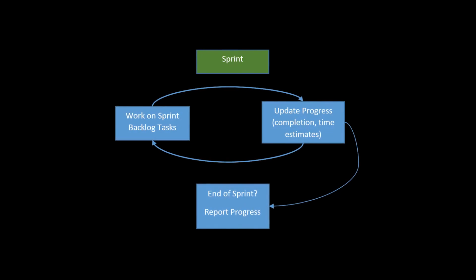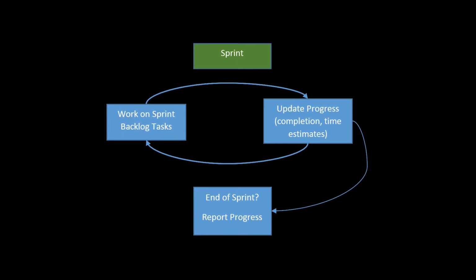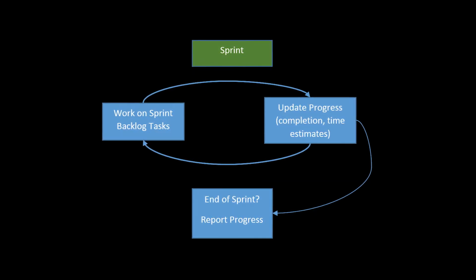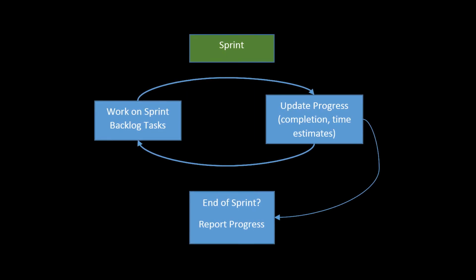After backlog tasks are delegated with appropriate time estimates, the sprint begins. During this time, you work on the task given to you to your best capacity. At QUT, we expect sprints to go for roughly 2 weeks before reconvening. During this time, you should make a note of how long you have worked on your tasks and how long you think it should take to finish them. This should not be an arduous process. Just take a couple of notes when you do some work.